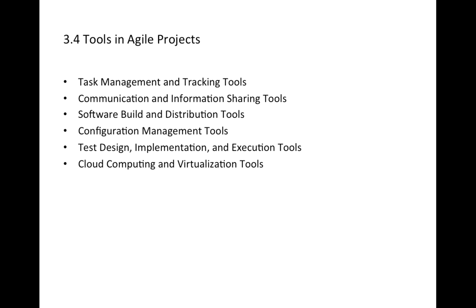These tools serve many purposes: record stories and their relevant development and tasks, capture team members' estimates on their tasks, associate development tasks and test tasks with the same story to provide a complete picture of the team's efforts required to implement the story, and aggregate developer and tester updates to the task status as they complete their work. All these purposes come under task management and tracking tools.